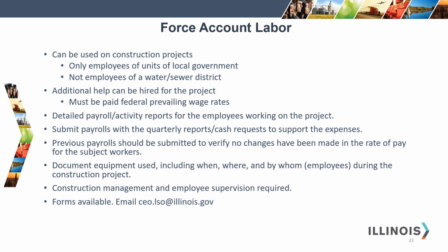You must keep detailed payroll and activity reports for the employees working on the construction project. You need to submit payrolls with the quarterly reports and cash requests to support the expenses. Previous payrolls need to be submitted to verify that no changes have been made in the rate of pay for the subject workers. You need to document equipment used, including when, where, and by whom during the construction project.